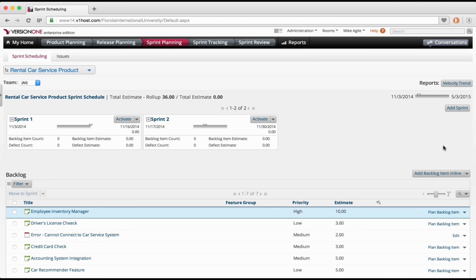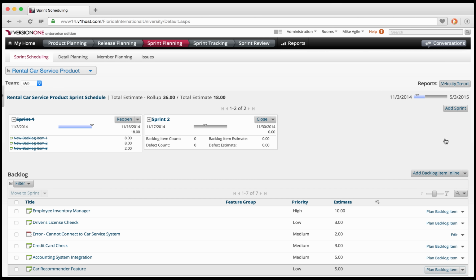We can exit this window now and could add backlog items to one of our sprints. I have added sample backlog items to Sprint 1 for illustration purposes. We see here the name of the various backlog items, together with their estimates. There is also a progress bar with an arrow above it that illustrates where in the sprint we should be. The blue color of the progress bar shows how many backlog items we've completed.